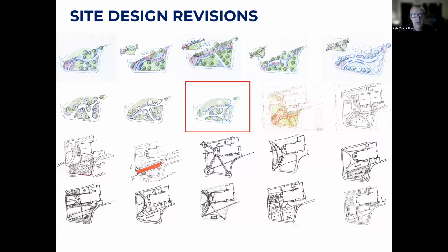So as we continued to advance the project, the CPA application caused us to focus on just the city-owned parcel. And then we went through that value engineering process where we thought, all right, we've got to distill the design down, simplify it to make sure we can fit the budget. The other piece of that is this project started in 2018 before COVID. Everything is more expensive after COVID: materials, labor, equipment. So the park we could have gotten in 2018 is now less; we can get less in 2023.